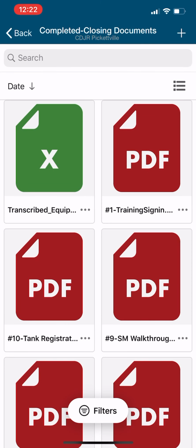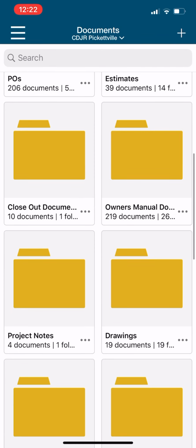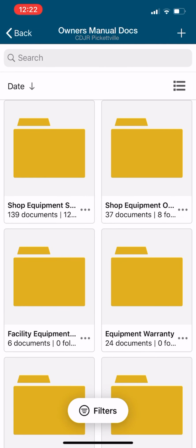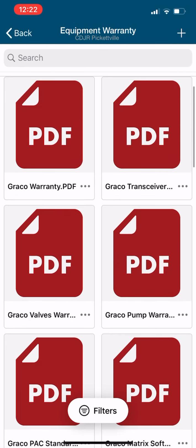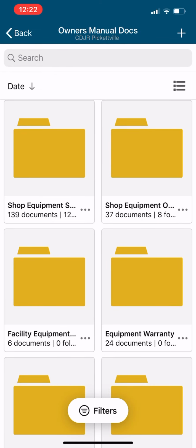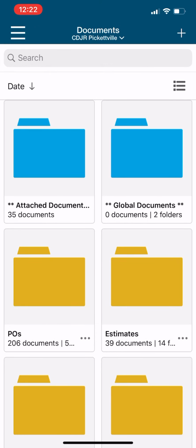And you can see how powerful that's going to be as then we turn this into the owner's manual. So this is where you're getting the equipment specifications, warranty information for all of your equipment. We use Buildertrend to also manage our warranty process for all the equipment. So that's where the owner's manual will go. We'll also save that to a thumb drive and give that to the owner as well during the handoff.